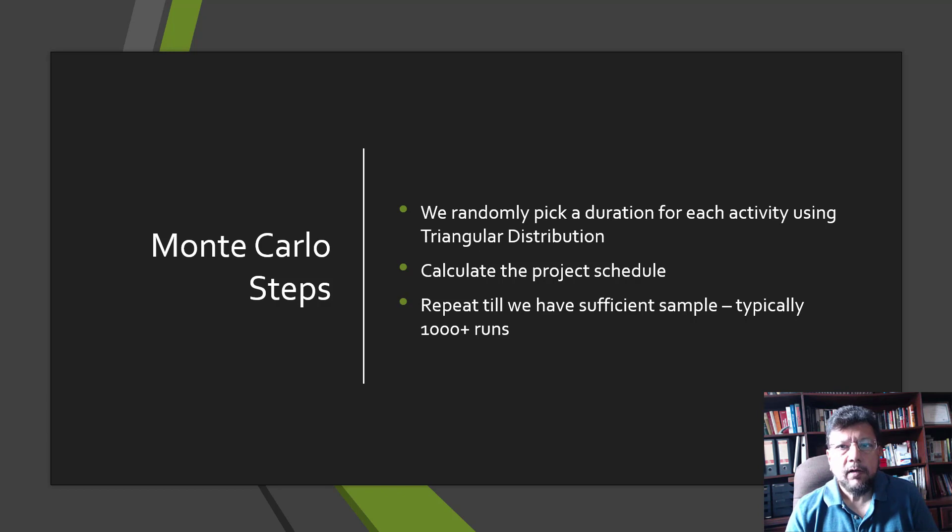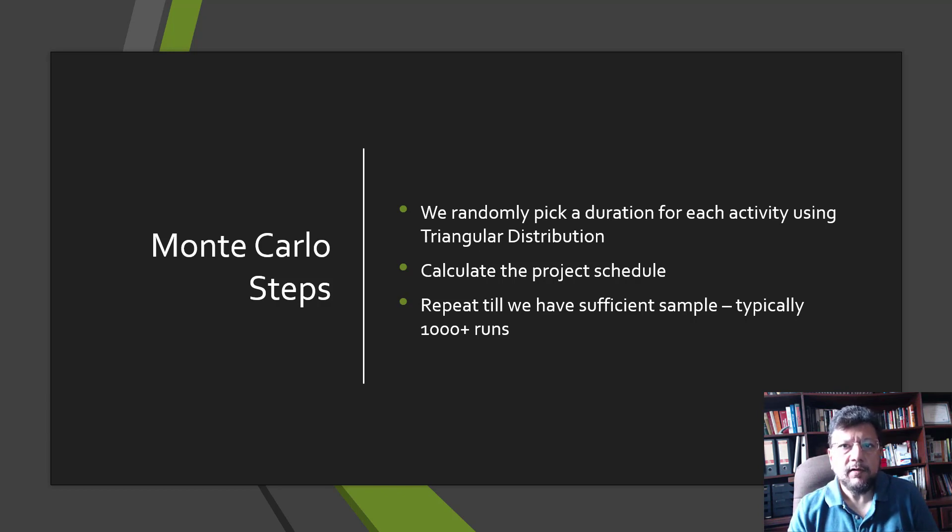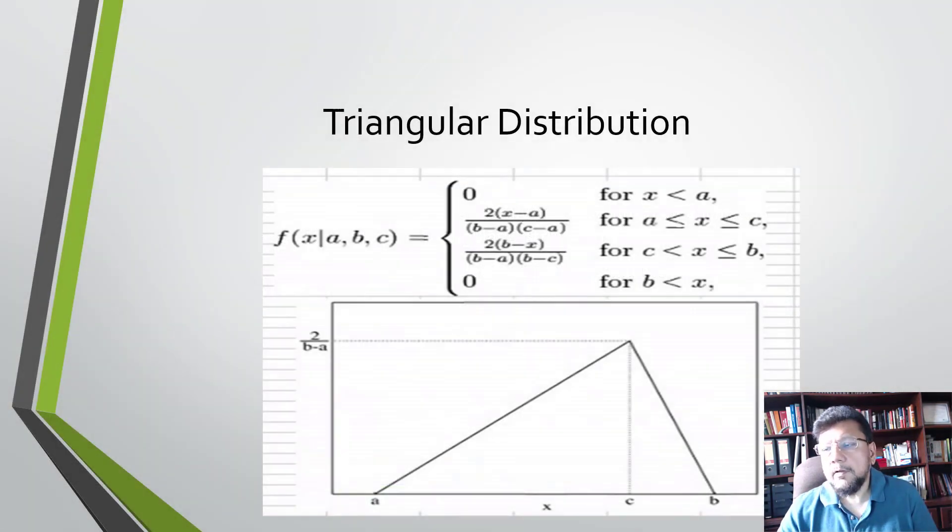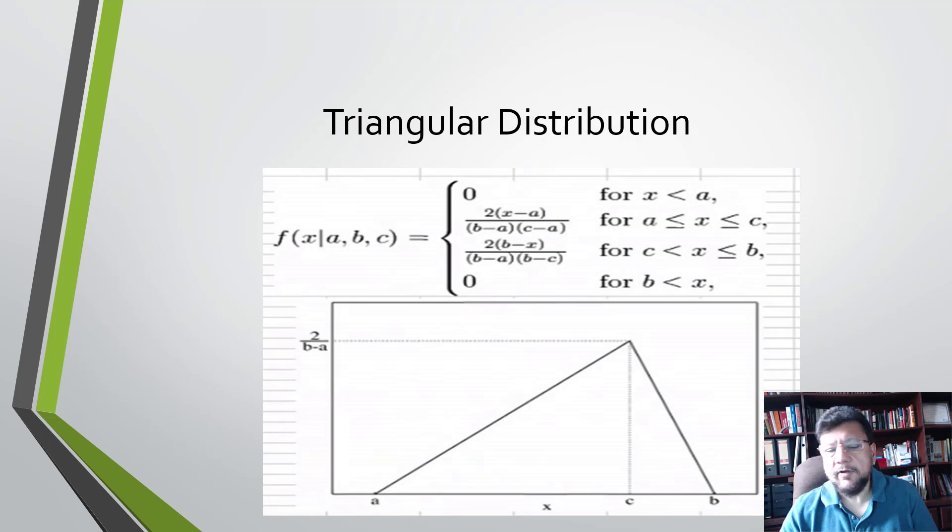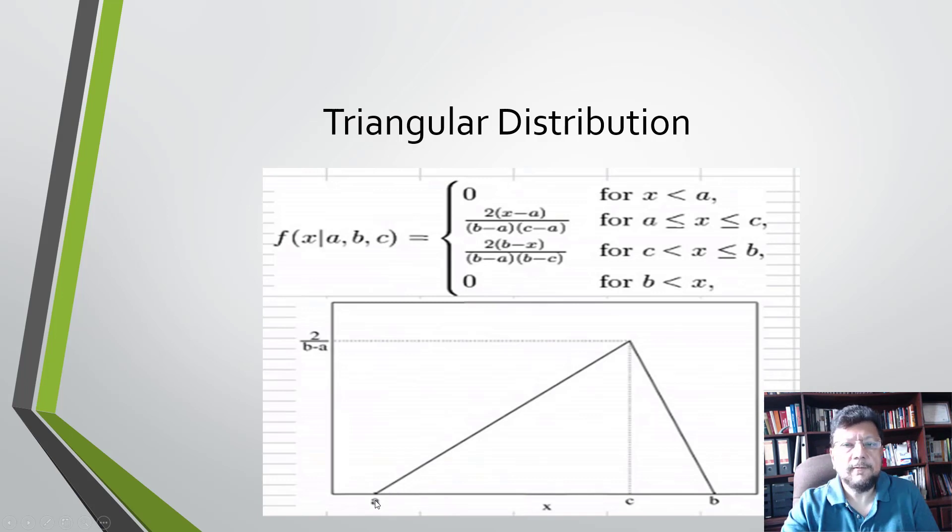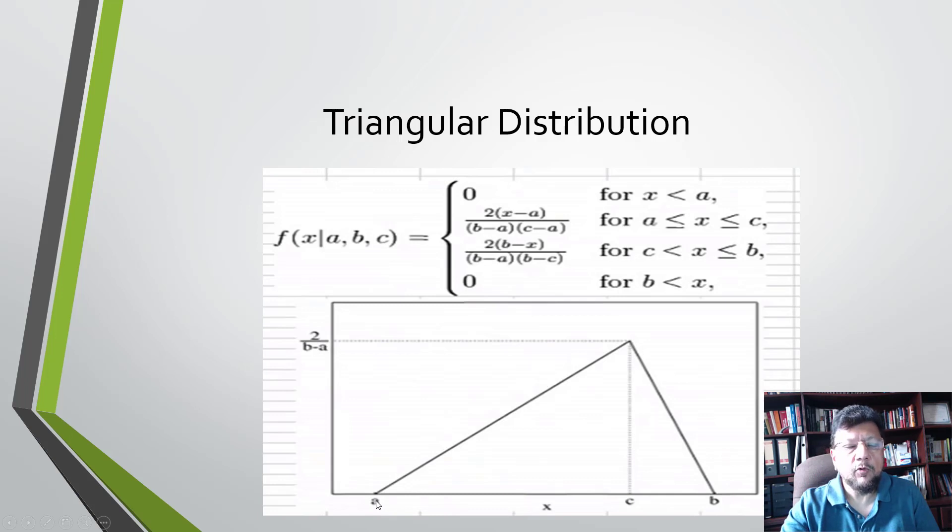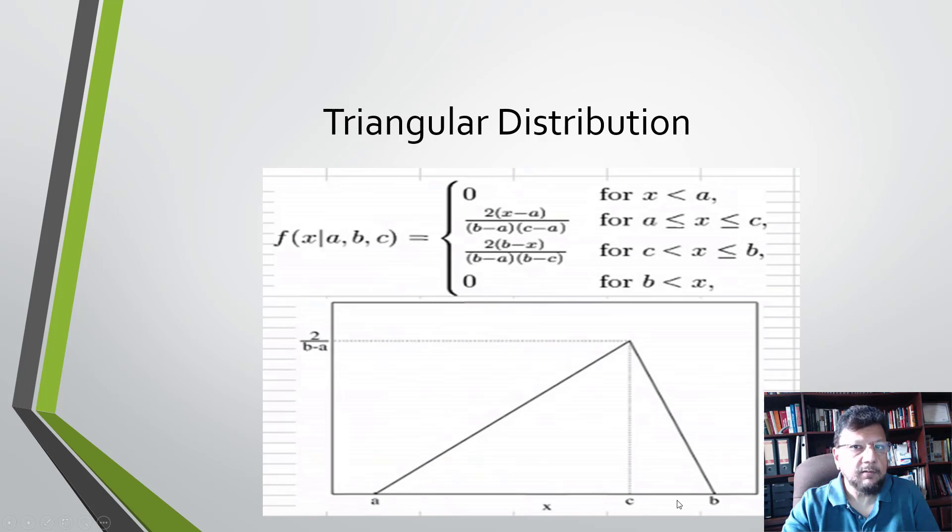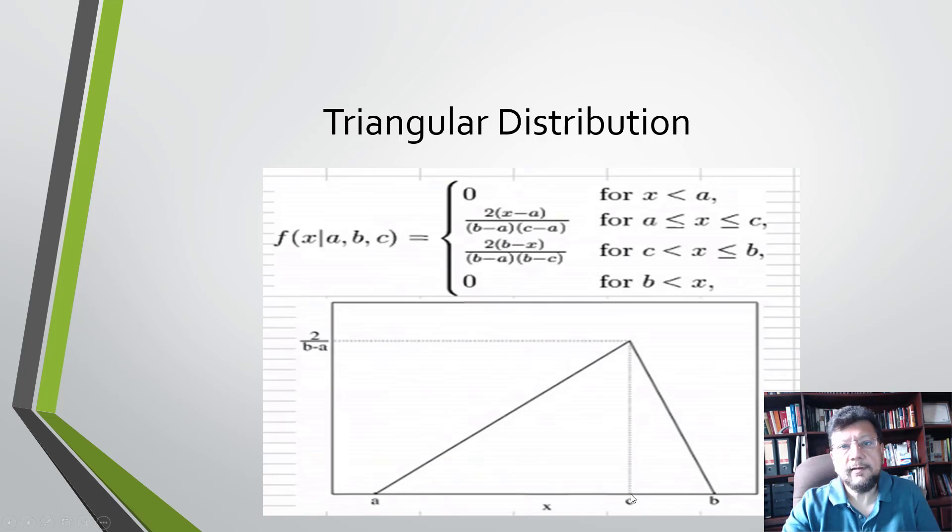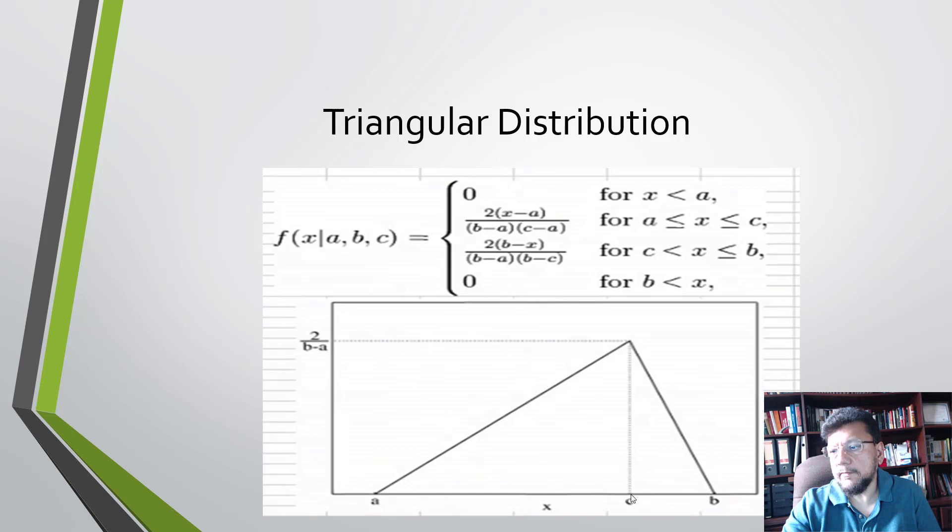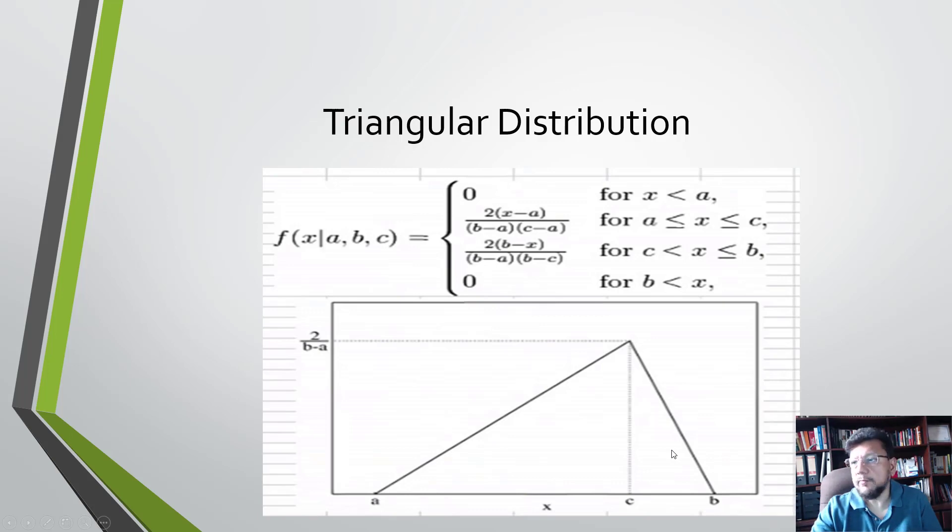Let's see a little bit more on the triangular distribution. The triangular distribution basically looks like this - it's a simplified distribution. A represents the optimistic, so no duration can be less than optimistic. B represents the pessimistic duration, so no duration can be greater than B. And C is the likely, so the most frequent duration that we will encounter is C, which is the likely duration.